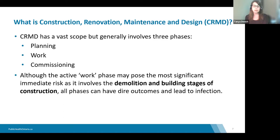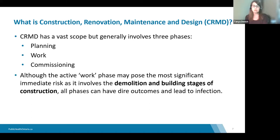Even simple things like reconfiguring a room, painting a room, or installing a portable AC unit fall under CRMD projects. All projects can pose a risk and escalate quickly into something more involved. You really want to make sure you follow the matrix that we'll go through later in this presentation.